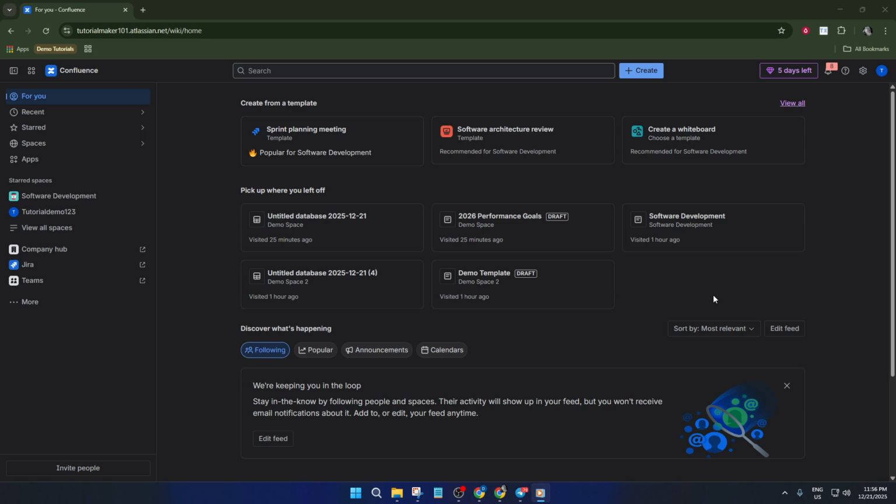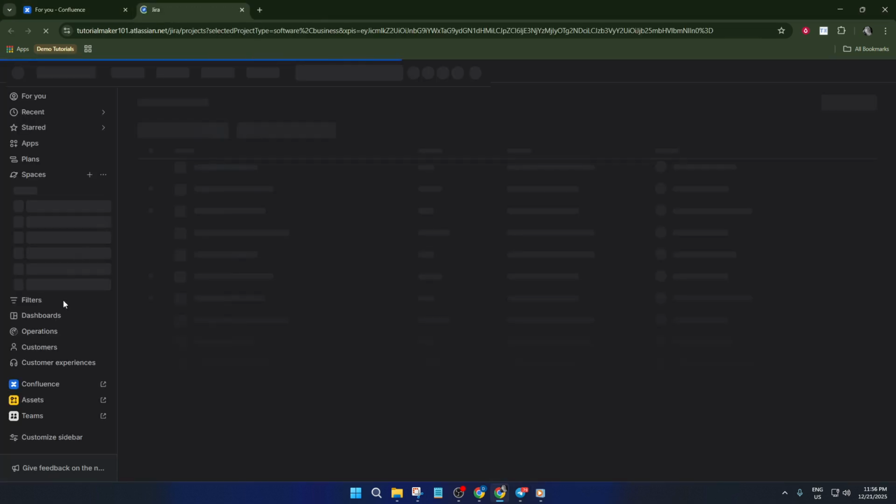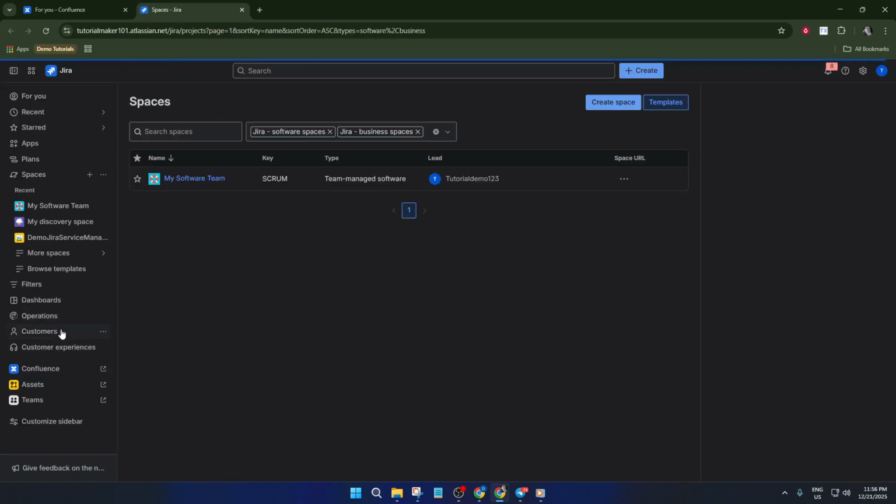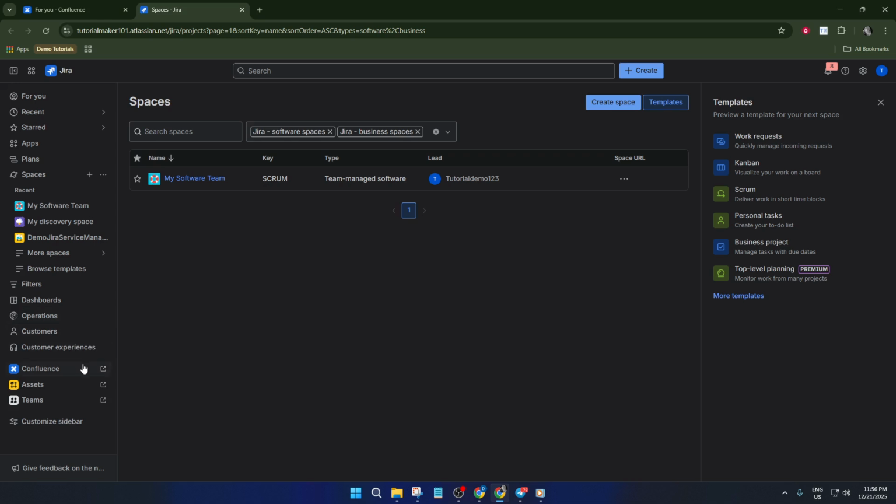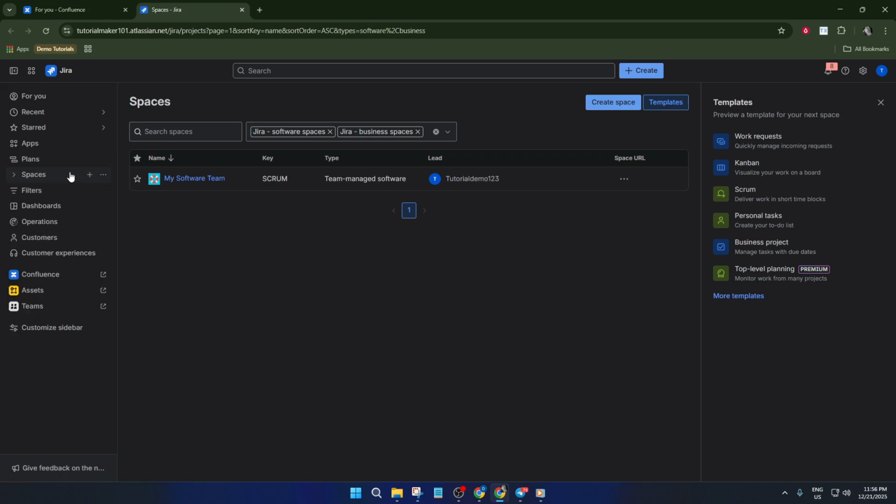First, in Jira, head up to Plans and select Create Plan. This is where you'll give your plan a name. Think descriptive and clear, like Q3 Product Launch. Take a moment to set your plan access. I usually recommend keeping it open so stakeholders who need to check in won't have permissions issues later. Remember, naming and access aren't just admin details. They help your team connect your planning space to your broader company context and ensure everyone who needs info has it at their fingertips.